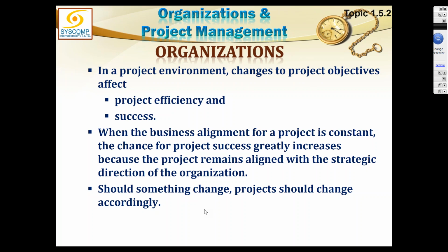Naturally, we are only talking about projects here, but there is a whole system of projects, programs, and portfolios. I have already explained to you earlier that portfolios are the first ones who bear the brunt of the change. They are tied back to back with the strategy. If strategy changes, the portfolio changes its direction. And if the portfolio changes its direction, it will re-evaluate all the projects and programs within the portfolio, and it may decide to kill certain projects which are no more required, or may like to realign the project objectives with the new strategy.